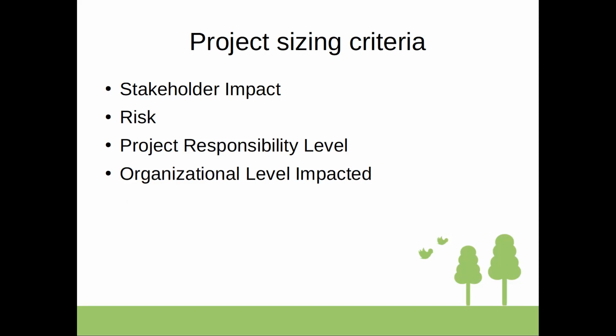That helps really. And that includes having a document structure, document details that you need to capture, potentially approaches for the project. Let's say if you commonly work with a waterfall approach, then it makes sense to standardize this waterfall approach for new projects, like milestones, deliverables, what kind of stakeholder groups are engaged.